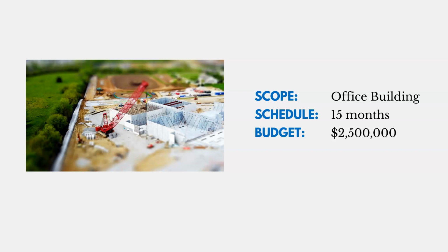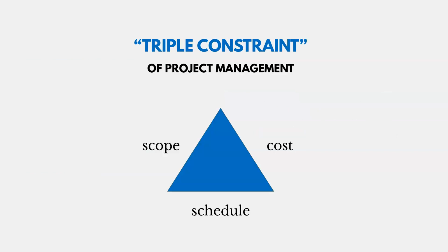Now in project management, we often refer to these three things as the triple constraint of project management: cost, schedule, and scope. Here's an example of why we call it that. Imagine us taking the scope side of the triangle and extending it by adding more work. If you think about the principles of geometry, the sides for cost and schedule have to change too. So if we add scope, we necessarily have to adjust cost and or schedule. And so we're always monitoring these three things to make sure we stay on cost, on schedule, and on scope.